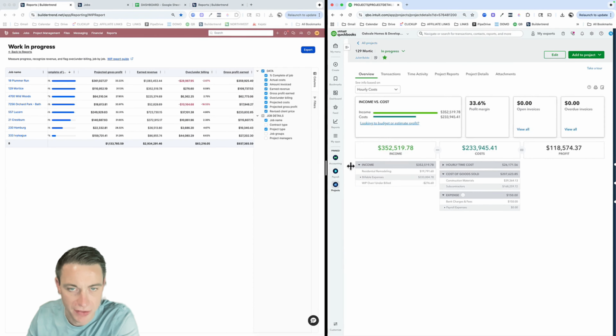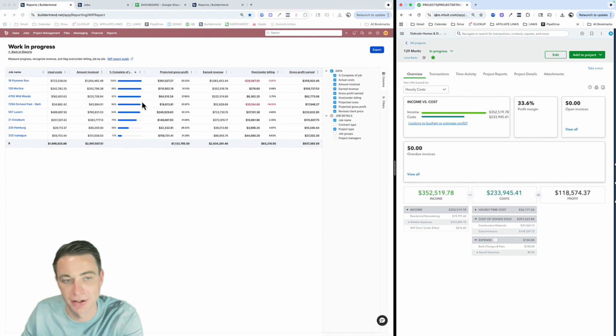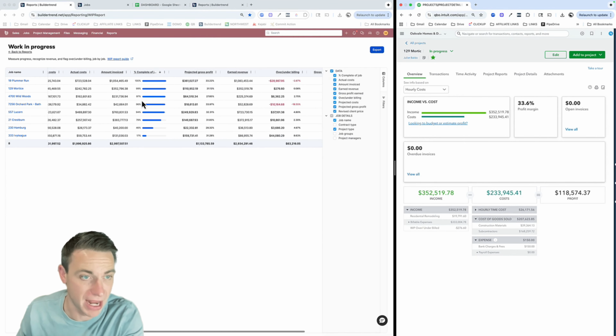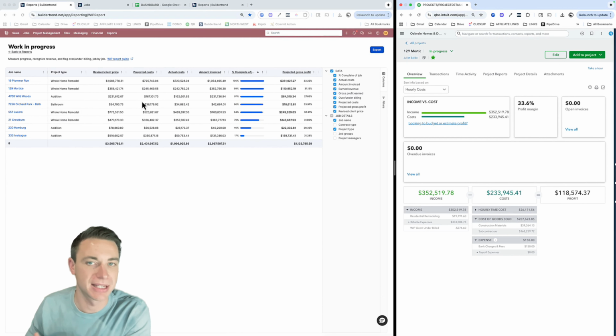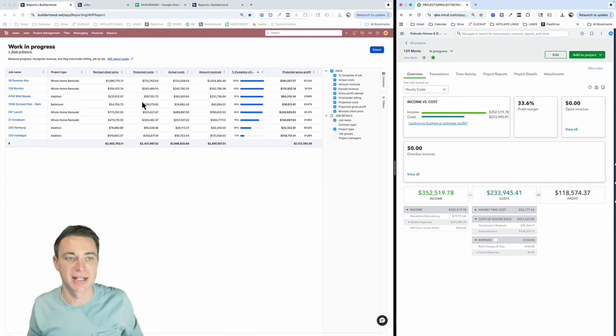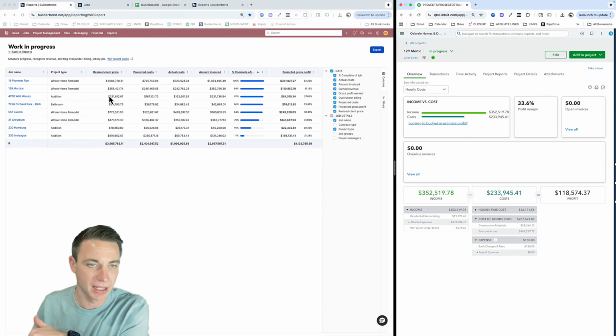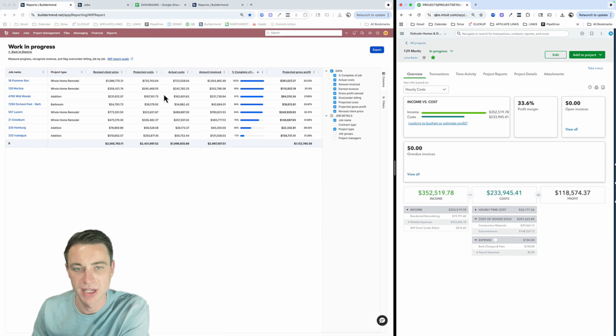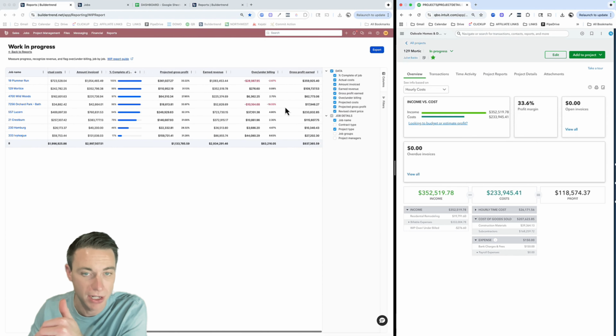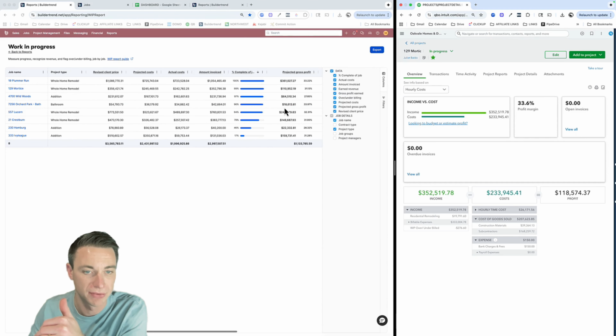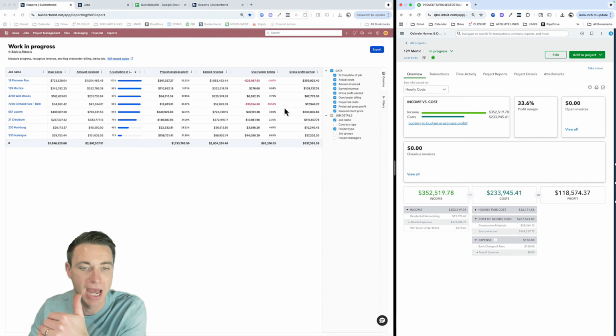But I want you to check out the WIP report. Ideally, or honestly, frequently what happens when we look at a report like this is we realize that maybe some of our data is off. So I would understand if you saw this and you're like, whoa, this doesn't make sense. It's like, well, let's check the data. Like, is our revised client price calculating correctly? Projected costs, actual costs. Is our budget up to date? You'd want to look at your job costing budget, make sure all of these are actually up to date. And if so, it feeds in really, really nicely and gives you an awesome looking report that's really helpful to understand, like, how am I doing on a cash flow basis?